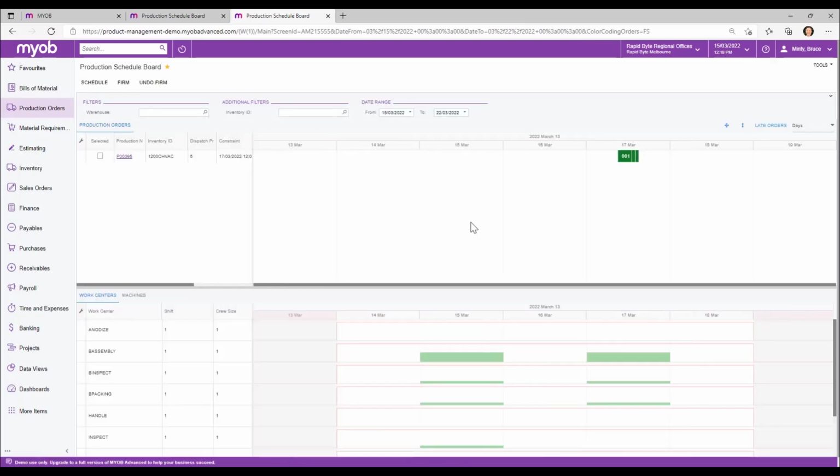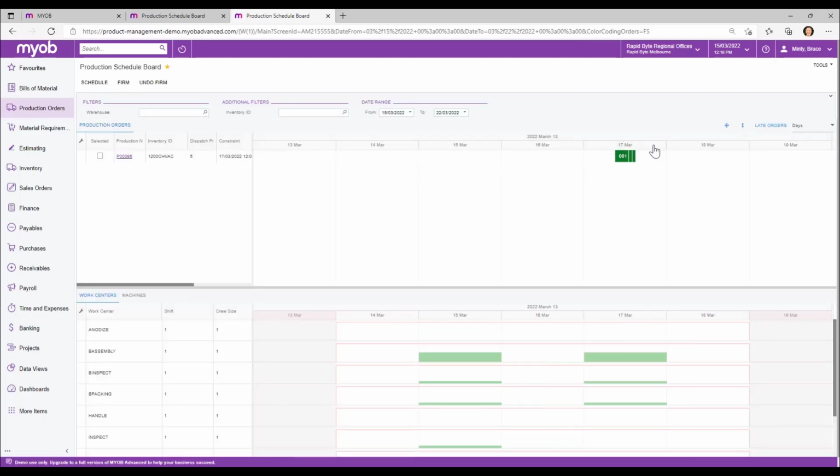And this really allows you to accommodate order escalations or high priority customer orders where promise dates are firm and they are aligned with what Capable to Promise has calculated. Notice the color of the operation bar has now changed as it's now firmed within the schedule. And of course, there's an undo firm button for obvious reasons.